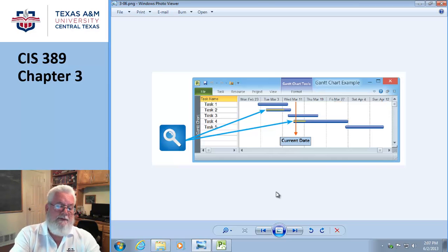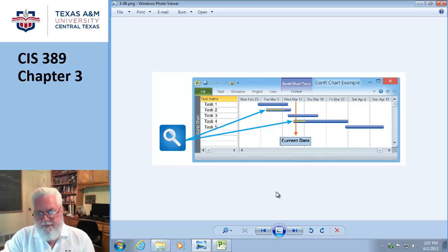I have to find out when the conference room is going to be available. I plug that in my chart, and then I move things around to match when that resource is going to be available. So some resources drive the schedule. For example, if the crane doesn't show up on time, well, okay, you're in deep.